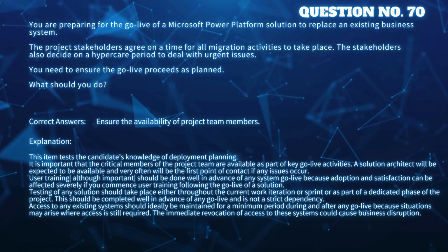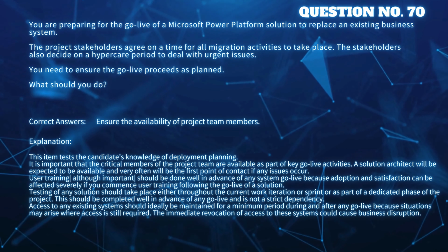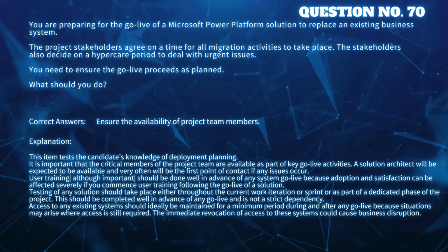Access to any existing systems should ideally be maintained for a minimum period during and after any go-live because situations may arise where access is still required. The immediate revocation of access to these systems could cause business disruption.